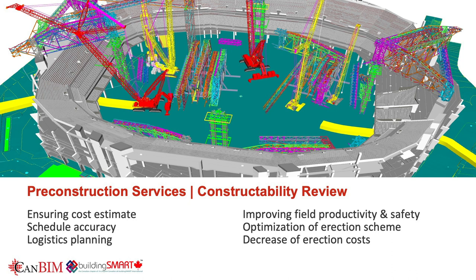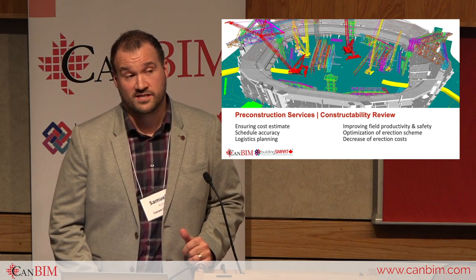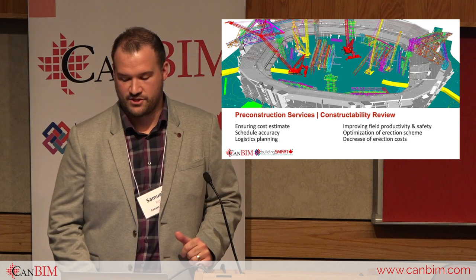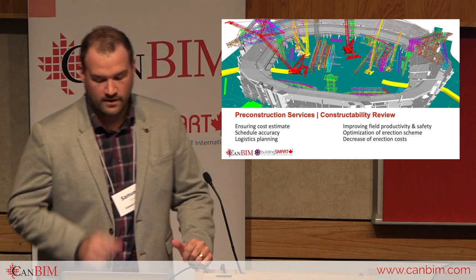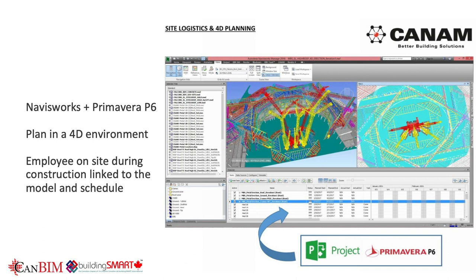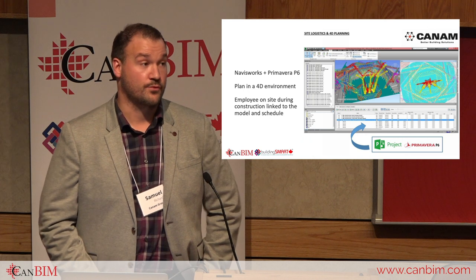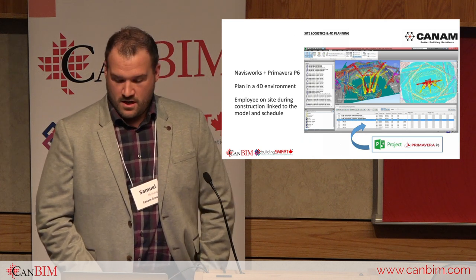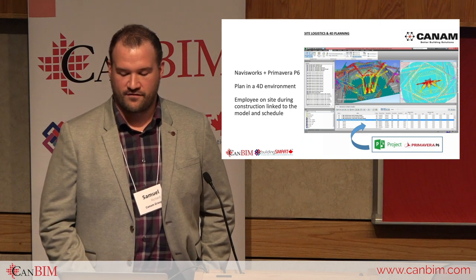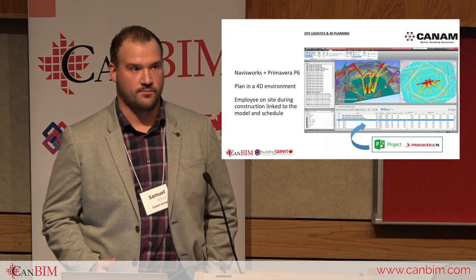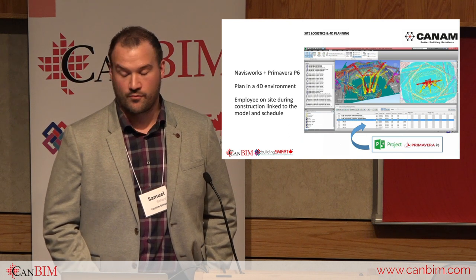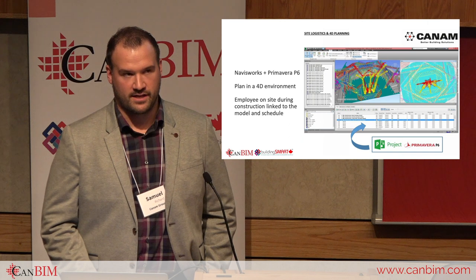However, at the end of the day, there's a human factor involved, and the erector's experience is very important — the erector will make the final decision on execution. With Navisworks and Primavera P6 project management software, we were able to plan in a 4D environment with crane movements attached to the schedule. However, the schedule is very dynamic. Many factors affected the schedule and site logistics, so we were not able to keep the model up to date constantly. This tool did provide great insight on steel erection concepts, planning, and safety issues.